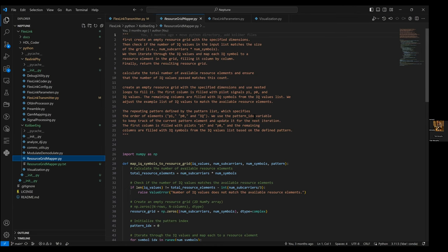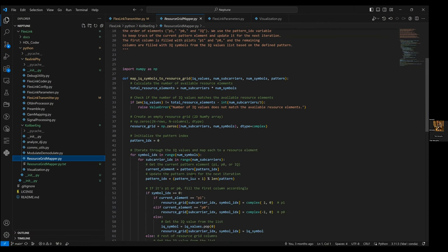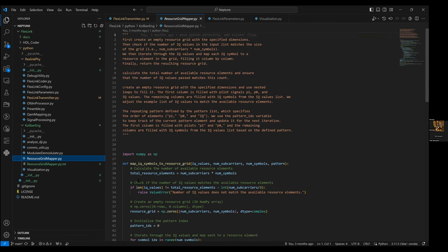So what I'm hoping for is for the Python side to get there first, so that we have a golden set of: here's your stimulus, here's your response. If your HDL matches that, you're good. That's kind of what I'm after. It's a very standard approach. So whenever we can get the Python model complete for the transmit side of Neptune, I'm going to be really happy, because that means that you're out of the critical path, and the HDL people are in the critical path. That's all right.